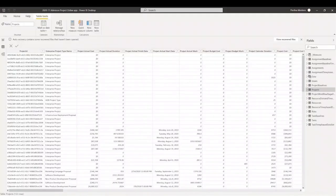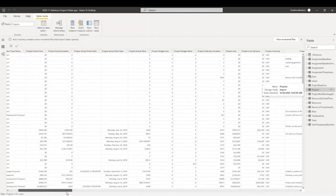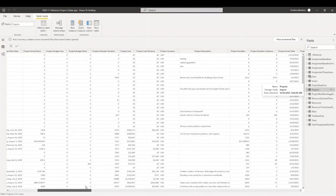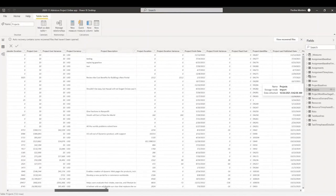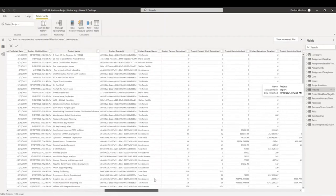Now that we looked at the visuals that can help you build a beautiful report to analyze your data for your projects, we can look at the type of data that you would be utilizing in these dashboards. I'm going to start by showing you the projects table and the type of information that you would see there. This is a high-level overview of your projects, but you can also see all of this information at the task and assignment level as well. The type of information you would see would be: cost, start date, finish date, project actual work, variance, description, duration, fixed cost, last published date, last modified date, project name, and project owner.